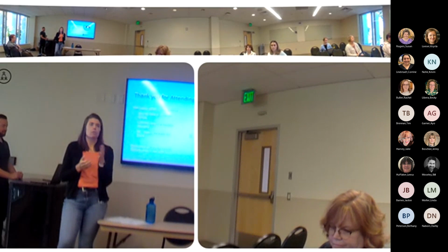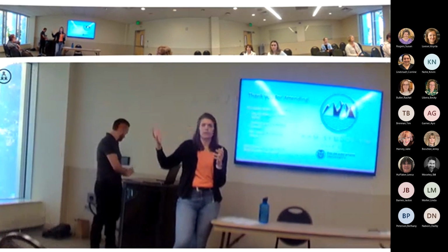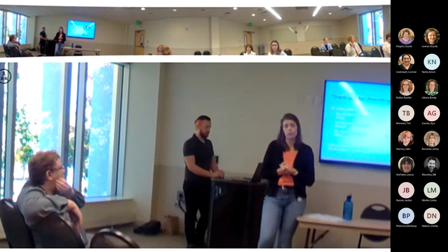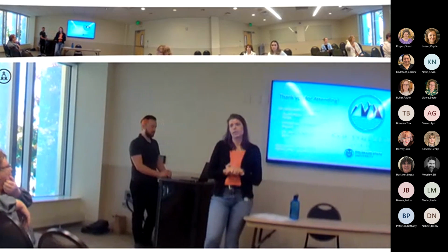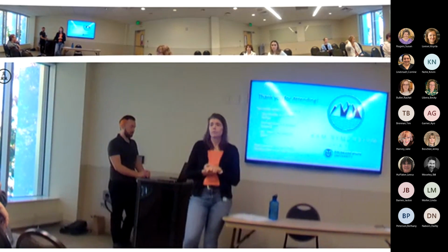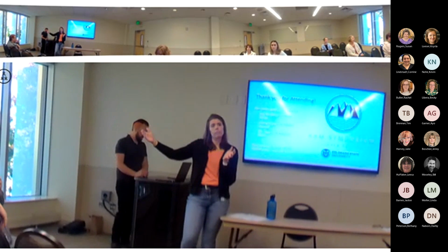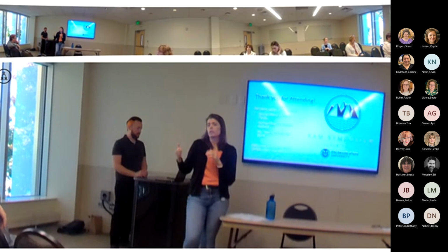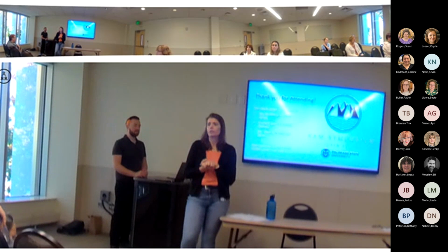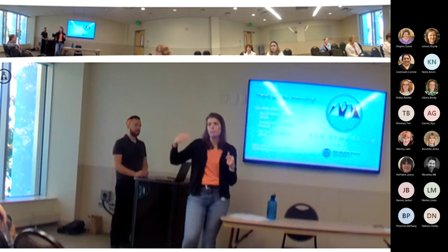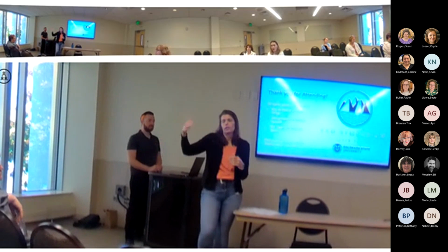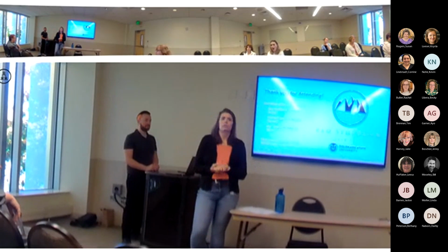So if you get in those scenarios where there is money left and you're waiting, because some agencies or some subawards can take forever to issue the next year's funding, work with your sponsored programs office team to request a no cost extension on that year 1 funding, or year 2 or whatever, so that you can keep spending while they finish everything else. And sometimes it's just enough of a push that they finish what they needed to finish anyway.